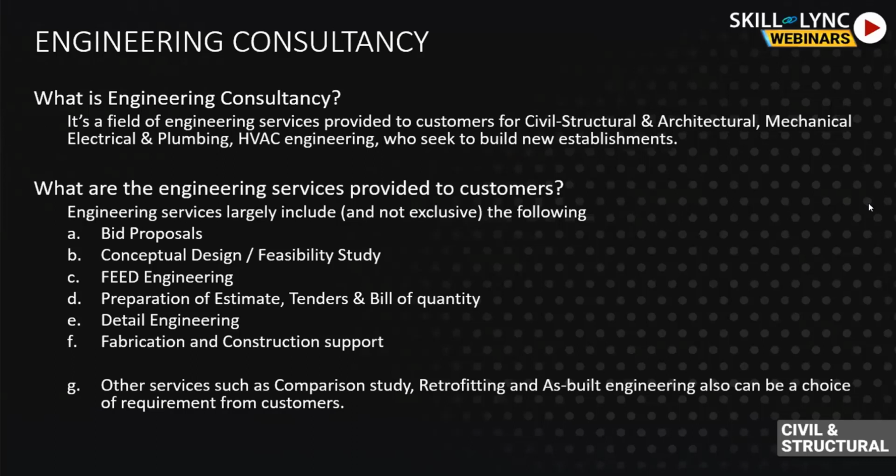During the construction process, something or the other gets changed, and ultimately some part of the structure looks a little different and gets built a little differently. So the customer may come to you asking for a service where you need to go to the site and make measurements of the existing structure, and come up with a final set of drawings for them for document keeping, in case they want to do some retrofitting in the coming times, and for further engineering requirements for those sorts of things.